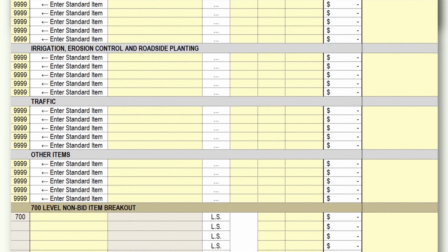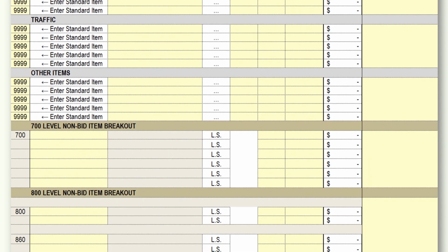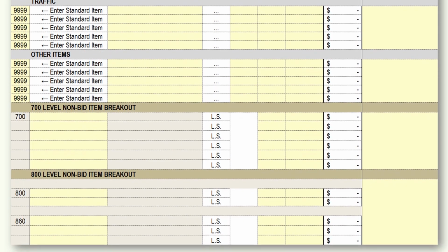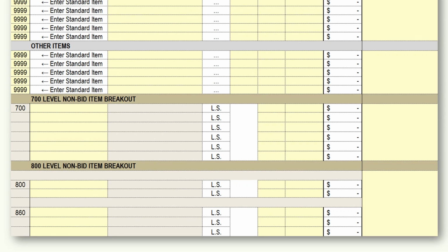Be sure to consult with the various specialty groups, especially the bridge and structures, environmental, traffic, utilities, and the construction office. Make sure, when collecting cost estimates from other team members for their portion of the design, that they do not ever include any inflation, escalation, allowance, padding, contingency, or any other type of adjustment for unknowns.